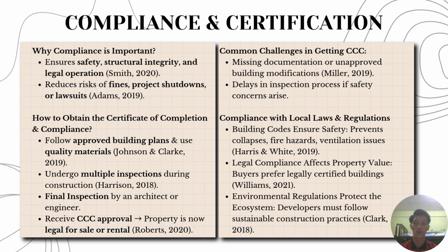The first one is developer must follow approved building plans and use high quality material. The project undergoes multiple inspections during the construction process. A final inspection by an architect or engineer ensures that the buildings meet safety standards. So once approved, the certificate of completion is issued, allowing legal sale or rental of the property.